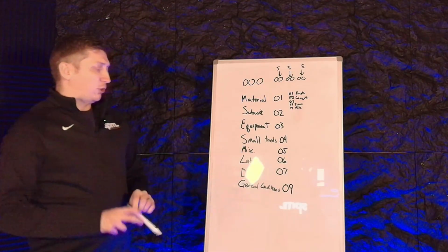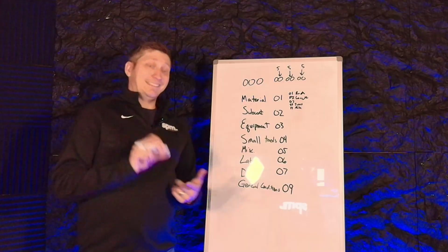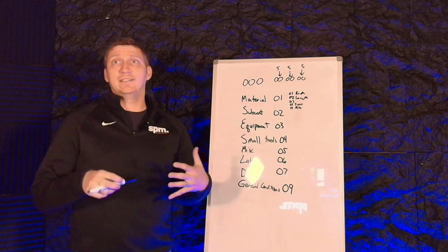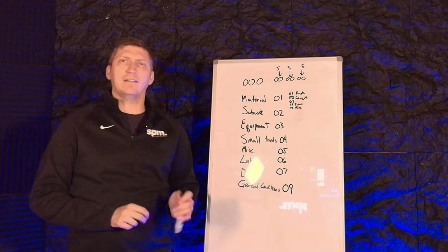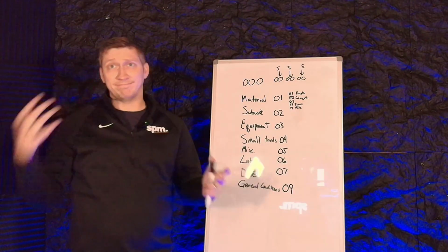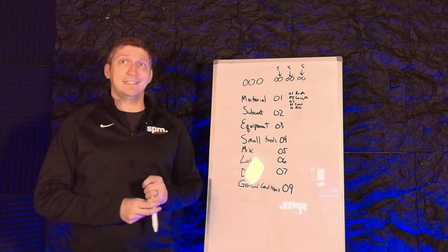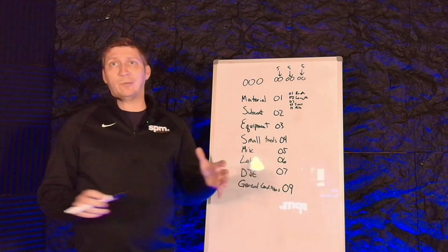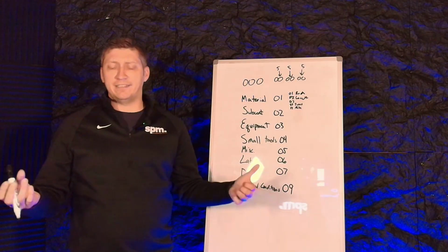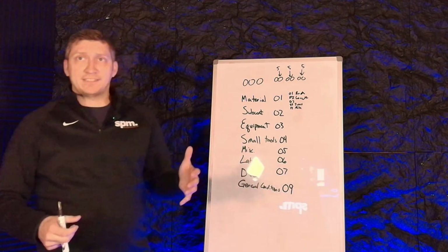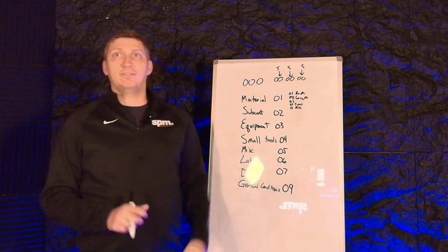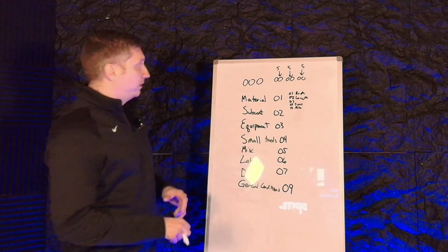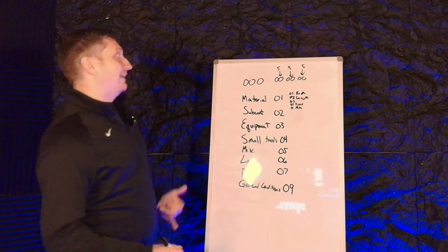And then the last one is general conditions. This is going to be your contingency, your bond, your special insurance if you have to get a very niche one, something like that, or your interest rates. You always track that with our clients. We know we have a 10% annualized interest rate and it takes net 60. That's about 1.7% we add to the bid, and we offer the discount. Hey, if you pay us net 5, you get a 1.7% discount on this work. And that's how you break that down.